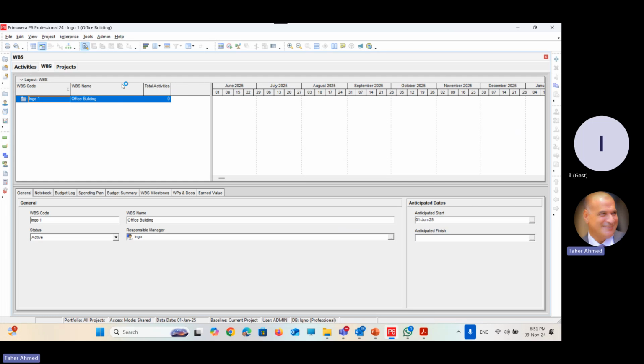How can I add to it? You have a sketch, right? Did you make a sketch with your team to represent what you are going to do? Oh yes, I have it. How to do it? Go to the command bar. Here it is, the command bar at the right side. You can notice plus or add. Click plus. It will make a child for the project. The project is a folder. The first child's code is 1, and you have to put the name of the child.